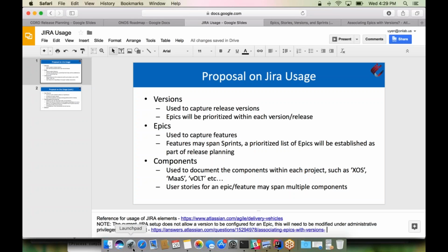But you can though, right? I mean, it depends on how you size the buckets, right? So the epics, the grouping here is entirely of our choosing. So you could potentially segment, if you have a staged approach to introducing an overall feature in the long term, let's say into three different stages, then you could separate the work into three separate epics, and in each of those epics you would have the work that's required to accomplish that task. And then you can call it done and move on to the next stage.